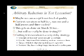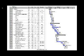And so you might end up actually, through this approach, having an end date that's much later than the originally planned end date, and with worse outcomes in terms of both schedule, not just schedule, but also quality, budget, and features. So not only do we miss the original planned date, the April 30th date, but we actually end up shipping something that's worse than we otherwise would have shipped, costing more, having fewer features. So really, it's a very good idea to avoid this. So it does happen. This is how the Gantt chart would look on the assumption that magic is going to happen.